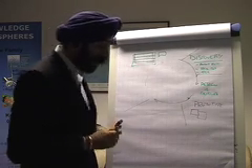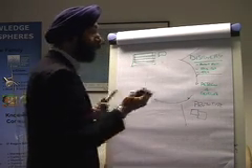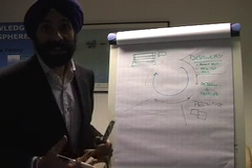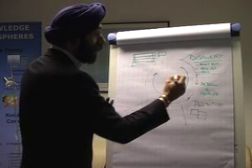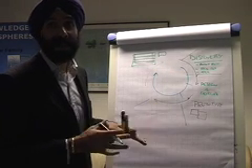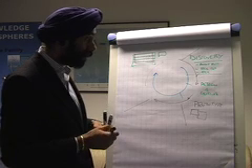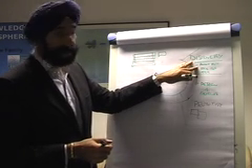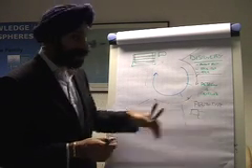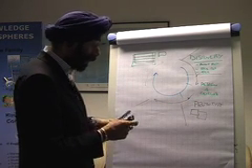And what you can also do is actually have what they call highlight reporting. So all the way along we can do status reporting, and that status reporting is every couple of weeks to tell them that we've actually achieved our deliverables or we're slightly further away. So once we've discovered what we need to do and we've designed what we need to do and maybe possibly developed something, we can trial it.